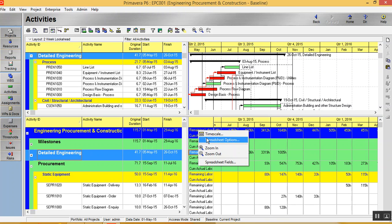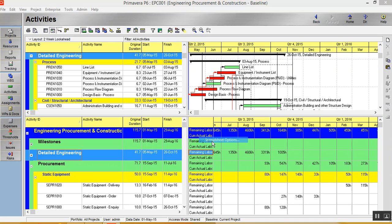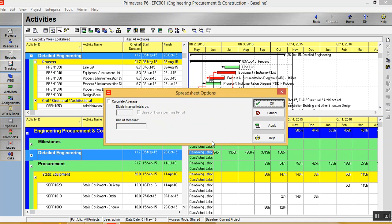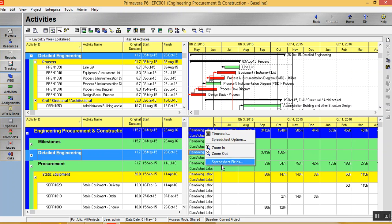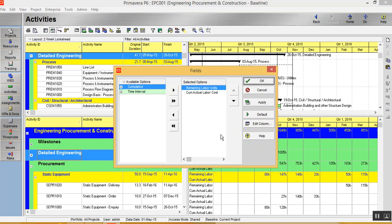So I'll just quickly tell you how to add those columns in your S-Curve. Just right click over here. You have spreadsheet options. Just click here and go in spreadsheet field and you can add the fields you want. Now you have the remaining labor and cumulative actual labor.